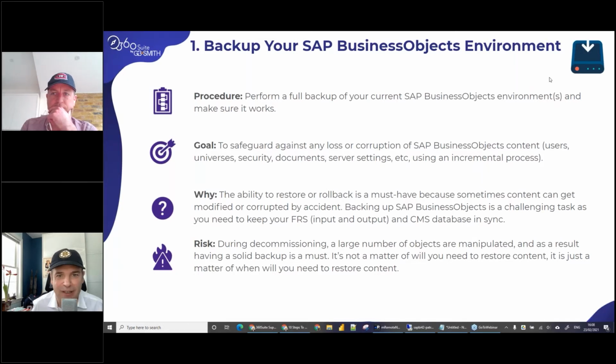That sounds like a classic one. If you choose to decommission once the new content is built on the new platform, if you choose to remove it in the old environment, make sure you have a backup, because it's quite obvious it's going to happen. Somebody will say, oh, where's that report I used to receive on a quarterly basis? Oh, we deleted the report, we don't know what it was anymore, right? So some people will make the old environment read-only for a little while until the new environment is ready. That's one way to do it.